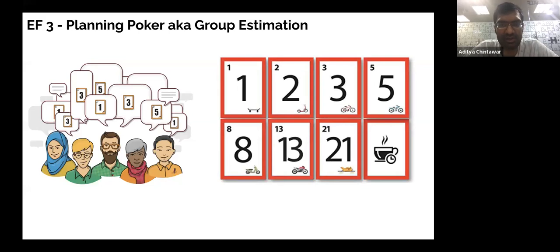It's typically poker. I say that, okay, this will take me so much time. So it's 1, 2, 3, 5, 8, 13, 21. To be really honest, I do not encourage any story above 13 points. I mean, only two things can happen: either the product manager is not sure of what he wants as an outcome, or the engineer is not sure of the estimation here.